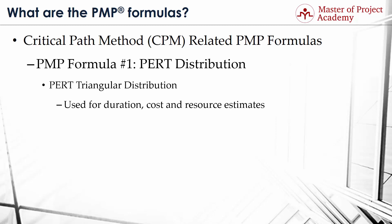Then you can use the PERT triangular distribution to estimate the activity duration. Accordingly, the PMP formula for the PERT triangular distribution is as follows: EAD equals the sum of O and M and P, all divided by 3.